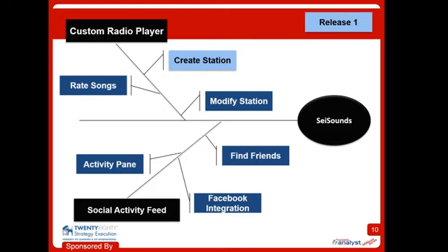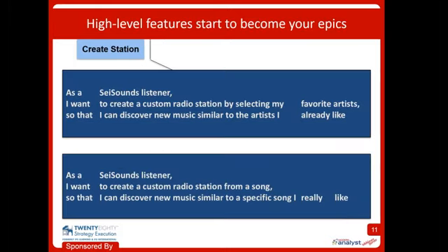Okay. One of the things I think is we've identified all these features, and I want to make that connection a little bit to thinking about epics and user stories, right? Once I have those features, those aren't written like stories. That's not traditional Agile, right? I put air quotes around that, but nobody could see it. Those features will actually help us figure out what the top-level epics are, and then they'll help us feed into our stories, okay? So going through that model is great to organize our thoughts and prioritize, but also to help us jump into creating the stuff that's going to go in the backlog.